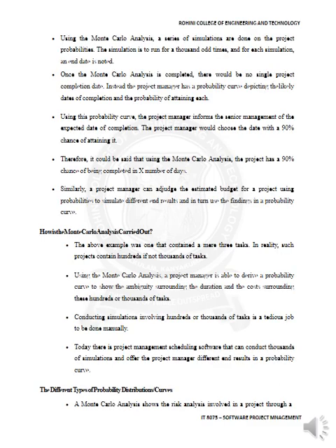So Monte Carlo analysis refers to a technique in project management where a manager computes and calculates the total project cost and the project schedule many times. This is done by using a set of input values that have been selected after careful deliberation of probability distributions of potential costs or potential durations. Using Monte Carlo analysis, a series of simulations are done on the project probabilities. A simulation is run 1000 odd times, and for each simulation the end date is noted.